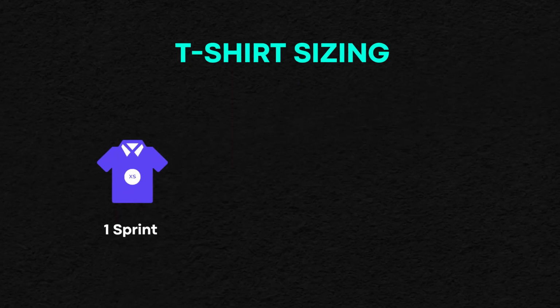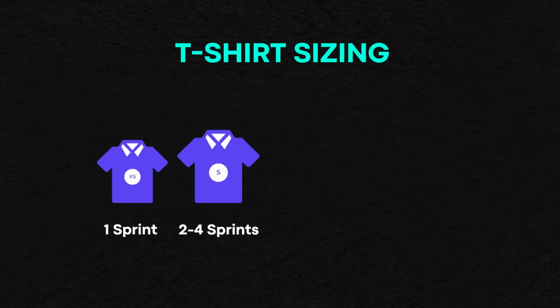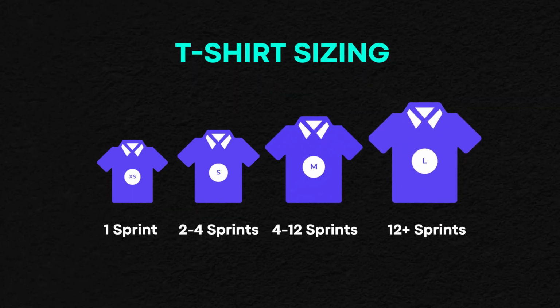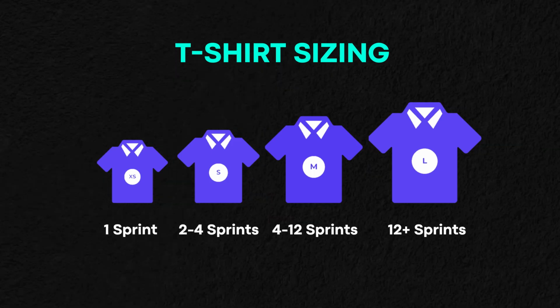So with that prioritization we get from the strategy of the overall epics and the overall major features we want, we can then rank them through the estimation processes. So t-shirt sizing is one you mentioned, and you can break that down with rough guidelines like one sprint, a couple sprints, maybe 3, then 4 to 12, whatever the definition is, but you can get an idea for doing that. Boy, I really like that one. That doesn't break my brain. T-shirt sizes, extra small, medium. I'm more of a medium.